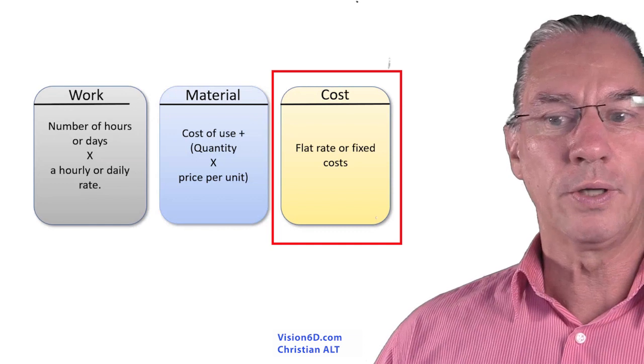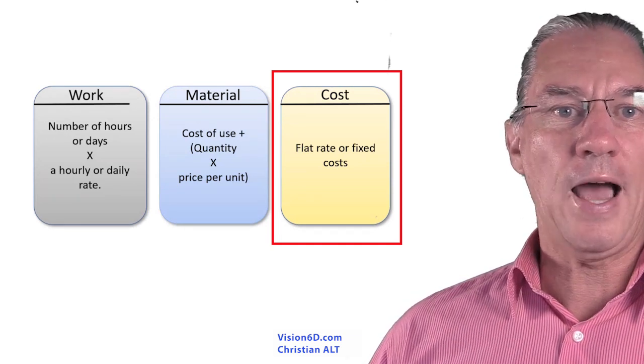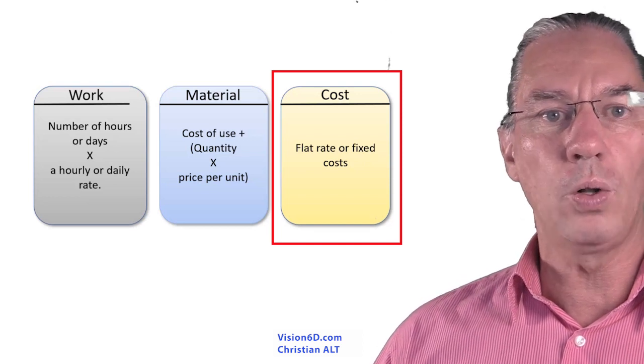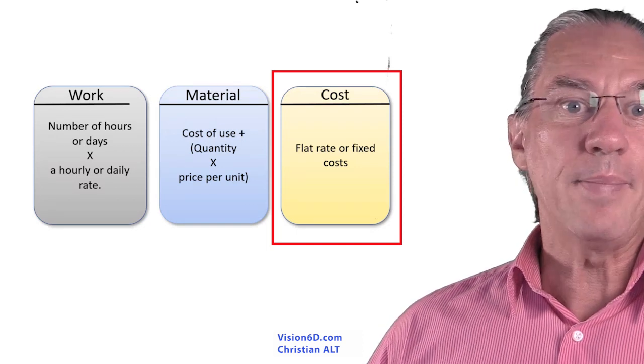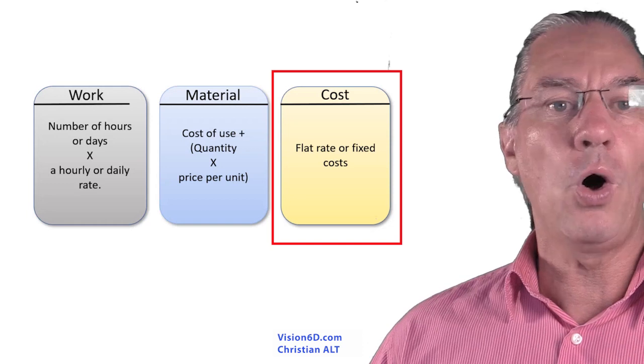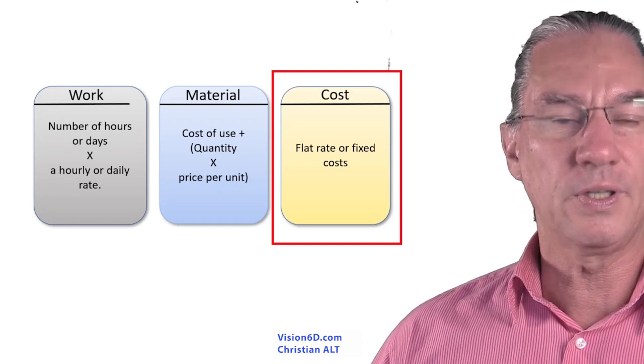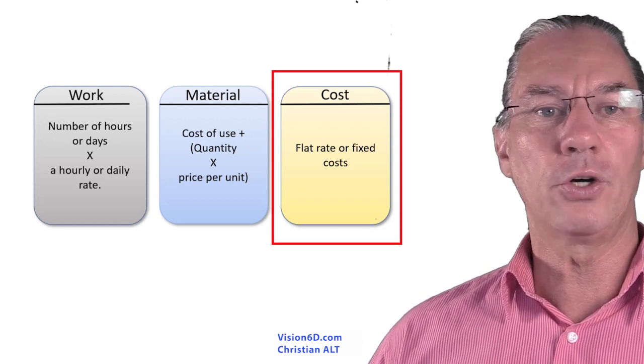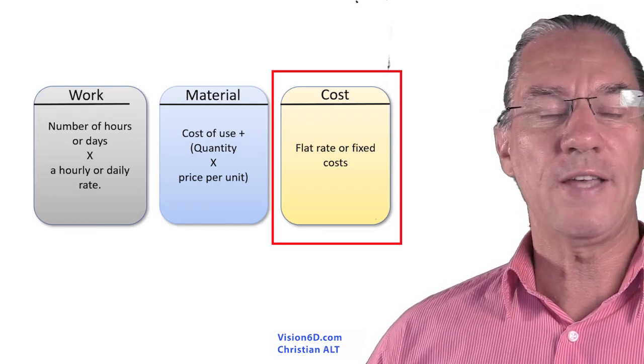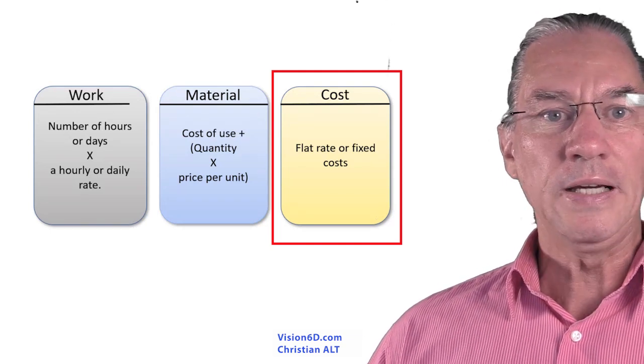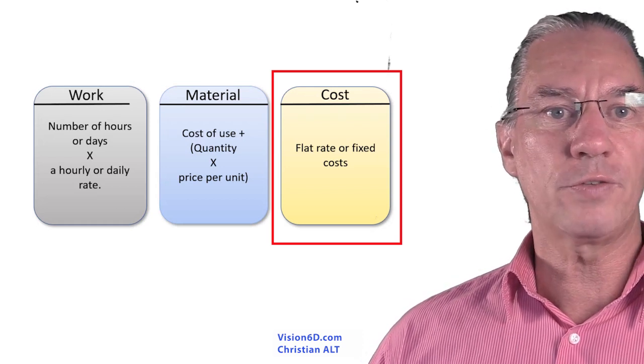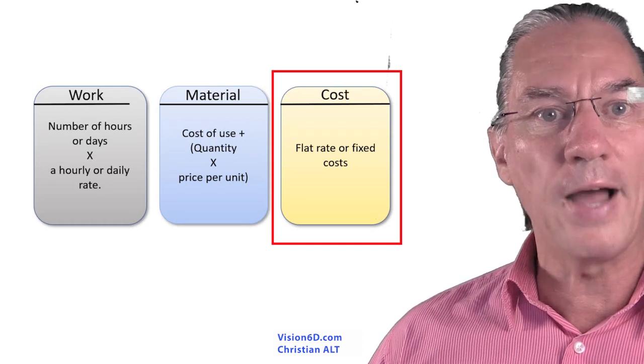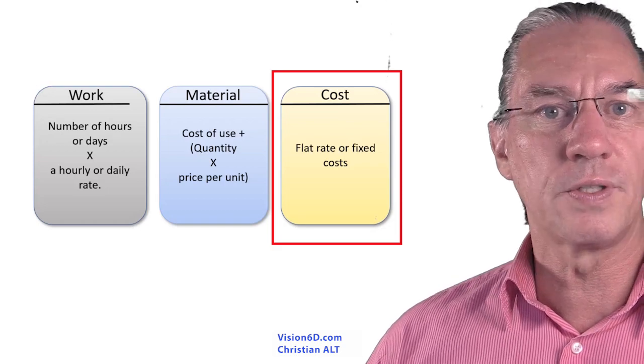The third one is just cost. In the case of my house when the carpenters did the walls, the ceilings, and everything, they made me an offer and I accepted the offer and all I have to do is pay a certain amount. I don't have to take care about how they are going to work or when. It's just a question of cost for me. There might be also in IT projects, for example, you are going to buy a server, so this is just a question of cost.